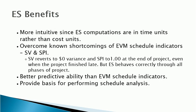The cost-based schedule indicators — Schedule Variance (SV) and Schedule Performance Index (SPI) — have known issues. SV reverts to $0 variance and SPI reverts to 1 at the end of a project, even for a late-finish project. But ES behaves correctly through all phases of early and late-finish projects, so it has better predictive ability.